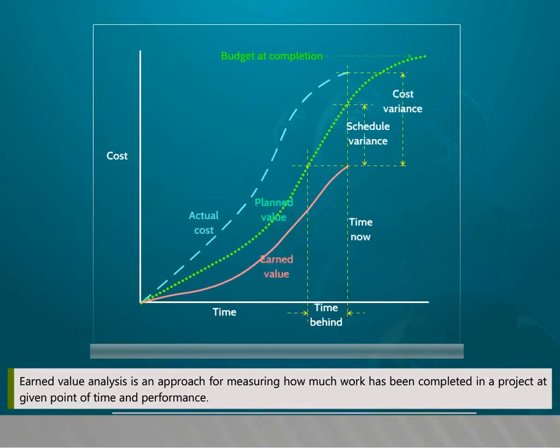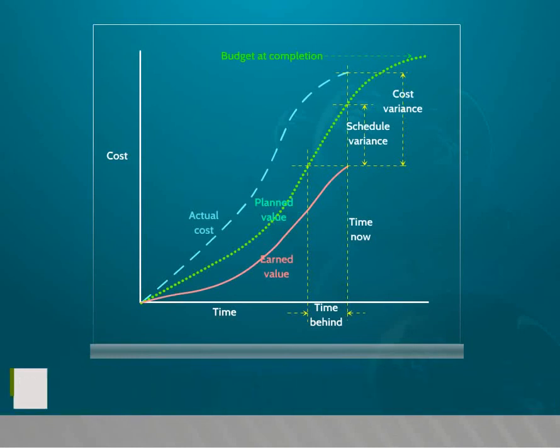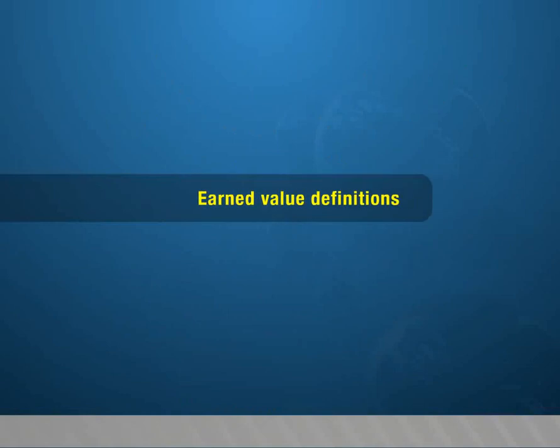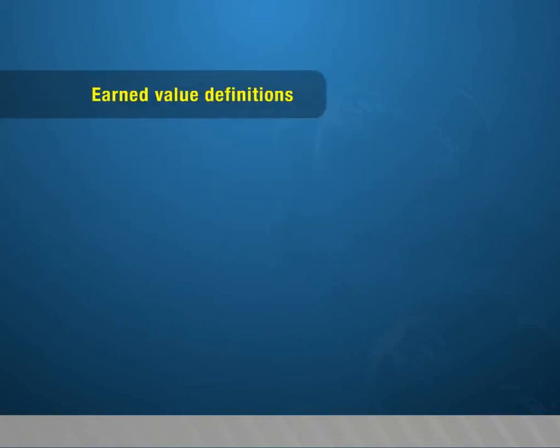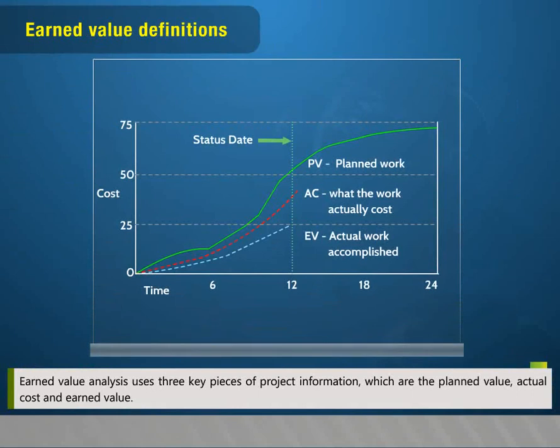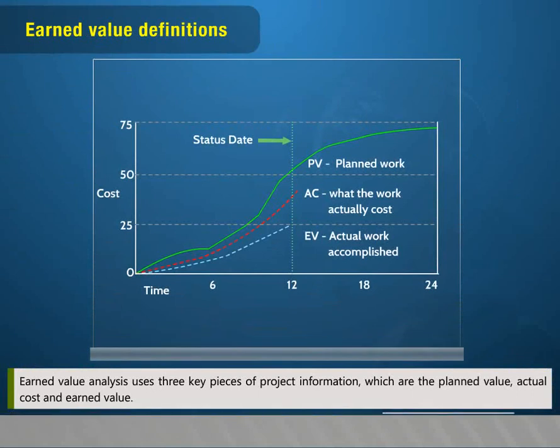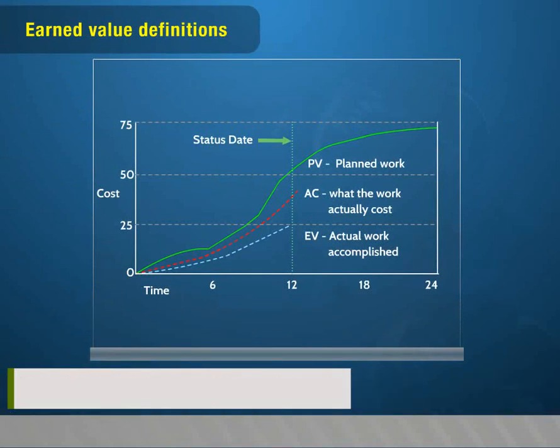Incremental milestones: work packages (WP) that can easily be divided into a series of tasks handled in sequence. Start-finish: low value and/or short duration activities without readily definable intermediate milestones.